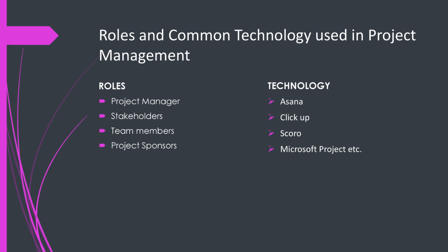Before you take on any project, there should be a contract defining the scope. That's where the planning and administration phase comes in, which defines the scope of the job. You know, okay, this is the scope of this. Outside this is not my scope of job. So if something like that's coming, you can easily define terms of variation and come back and say, okay, if you want me to do this, we're going outside my scope. You are paying extra. We are extending the time frame. We are being flexible in the quality of job you are getting and stuff like that. So the issue of scope should be defined effectively from the planning stage.